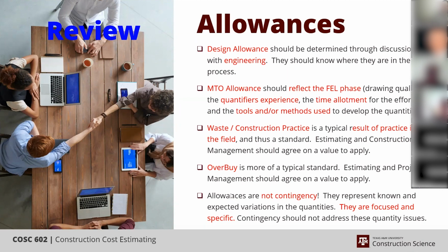Waste in construction practice, we know what our typical construction practices are. We know that they're going to overpull cable and cut it and drop it. We know that there's going to be drops from the pipe left as they fabricate that can't be reused. And we know that people are going to accidentally buy more than they need of some consumable items and some bulk materials, either because it's a mistake and they ordered more, there was confusion and they ordered more, or you needed a certain quantity and the items are provided in something more or less than that quantity, and you can't buy exactly what you need.